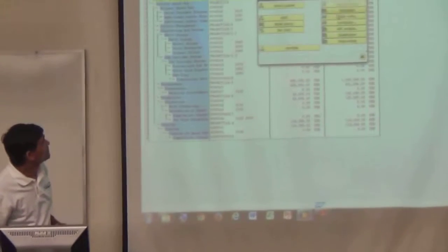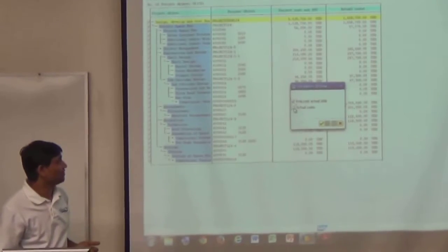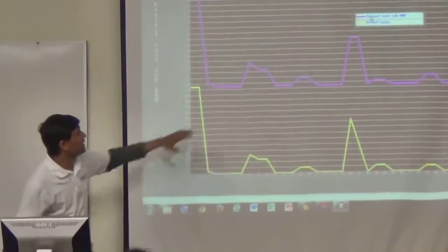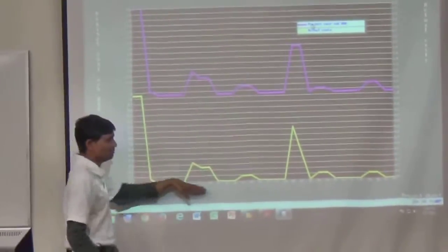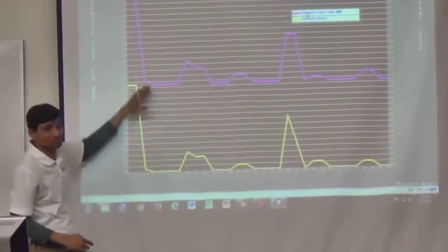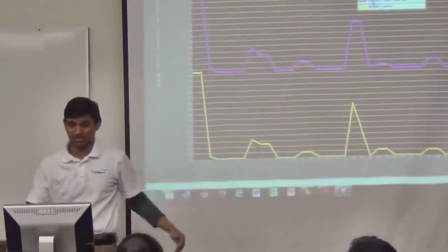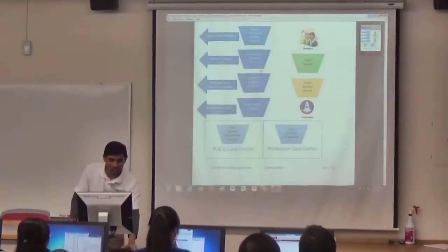And the other one is the correlation. If you are aware of statistical analysis, the correlation shows how the plan versus actual cost is going across the different activities. You can see the activity number right here. There's a strong positive correlation between the activities, except for a couple of activities where you don't find any correlation.